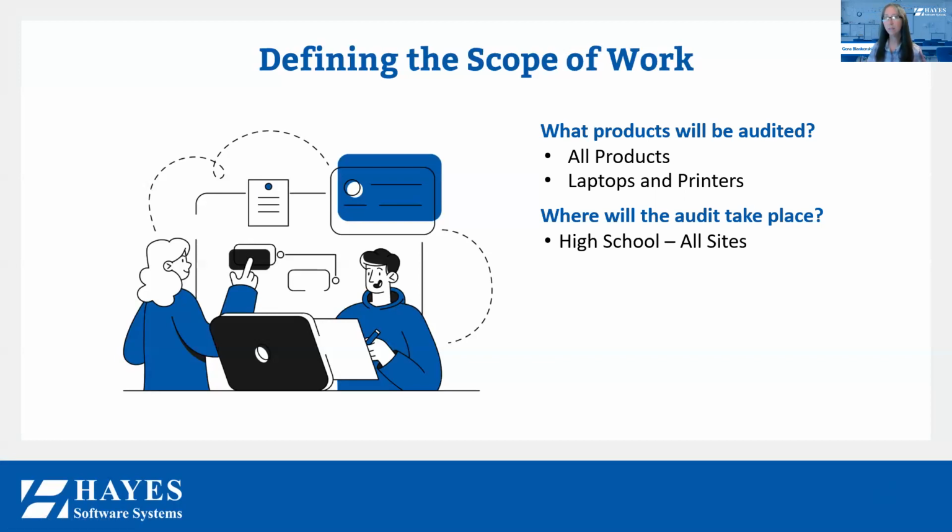Remember, every single asset in TIPWeb-IT is located or assigned to an endpoint that is a room, a staff member, or a student. Are we planning on auditing every room, every staff member, and every student in the same audit, or are we going to split those out? These are the functionalities we have within the audit. And these types of decisions, once they're made, are going to change how the district approaches the audit, how much time it takes to do the audit, and so on.